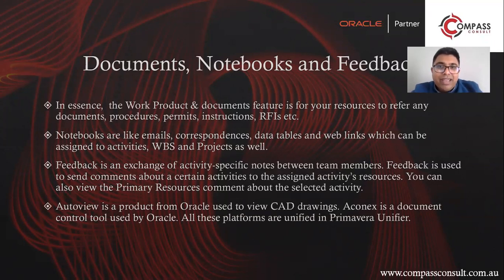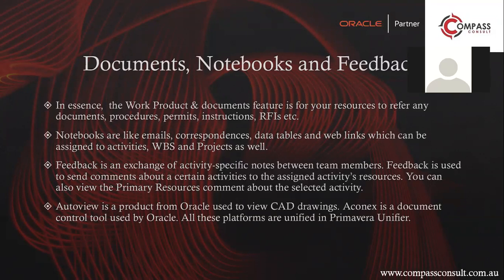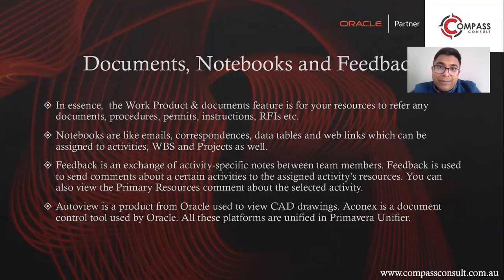We level it that way, in a way that they are able to see all the projects as per the cash flow update. So when the cash flow is updated on the project, they come to know whether the project is in good shape, is it making money for them or not. So they can decide whether they need to move resources from the project which is not performing and is not a priority, to the project which is actually a priority and is not performing well. So what they are doing is, one project is not performing well, is not having priority, they are moving the resources to the project which is not doing well to make it do better. All these decisions you come to know when you use EPPM.